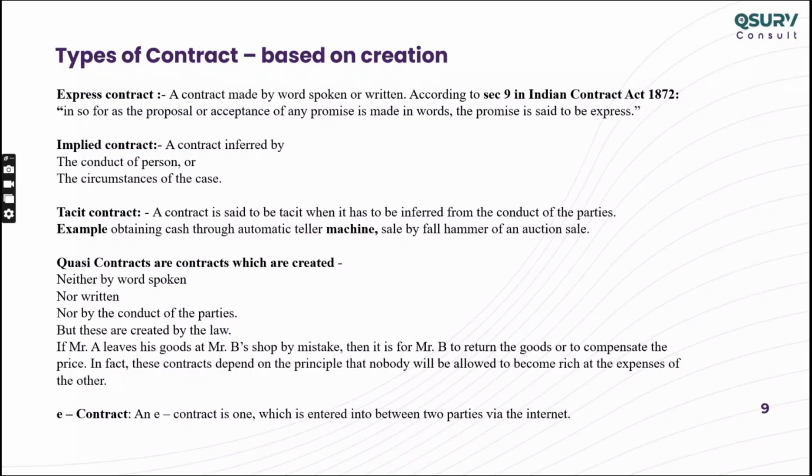Similarly, a supplier has a contract in place or a PO issued, but after the PO value has been used, the supplier is again issuing and you are receiving it and using it also. At the end you are telling, no, there's no PO, so why should I pay you? That means an implied contract is in place, even though you received the material and are using it.